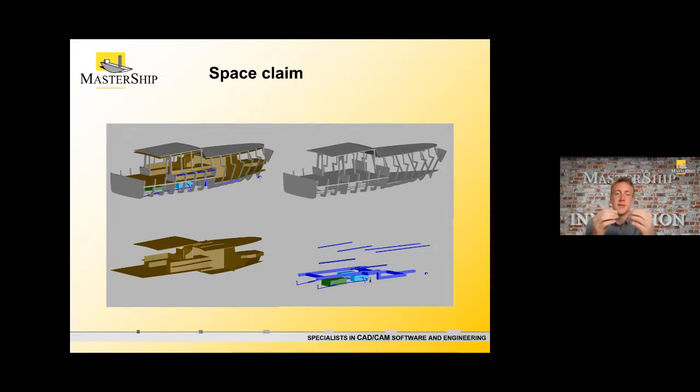And if you do not do this, then for sure those assumptions will conflict with each other. If you do not put this in a 3D model together, you surely have an overlap of the different disciplines. And when there is overlap, you will get collisions in the end. So when you do this properly at the early design stages, you will reduce the number of collisions between the different disciplines. And you will significantly decrease your lead time because all the different disciplines can start at the same time.